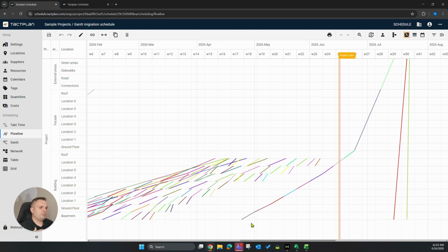Preferably, we would like to think of it as just one task performed across the whole location. So instead of creating 10 or 12 separate subtasks, which I need to connect and maintain later, I would prefer to think of it as one continuous task across all the locations, with sub-activities referring to each detailed location.